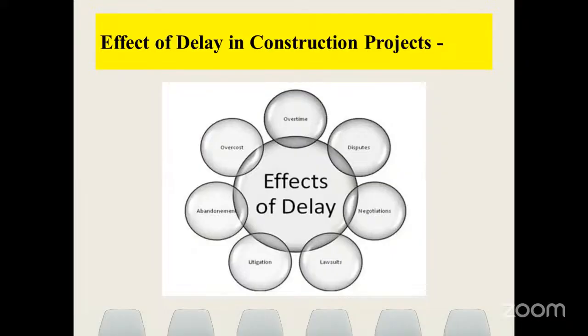So here we have the effect of delay. First is overtime. We have to give overtime for the workers, or we need to work extra. We need to pay overtime for equipment, machineries, and all. So that overtime will result in over cost, or we have to spend this amount from our end. Secondly, disputes.